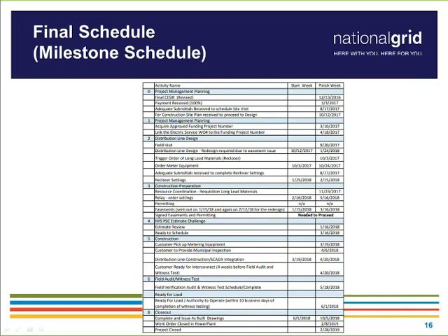So the easements were sent out on or around January 15th. We need to get those back by March 16th. Some other things, picking up of the metering equipment needs to be done by March 19th. So all these dates will give you an idea of what has to occur and when it has to occur in order to meet this June 1st estimated connect date. And if any of these dates slip, that endangers this date here, the June 1st date, and may push that out. So a very important document to discuss on all your construction calls.